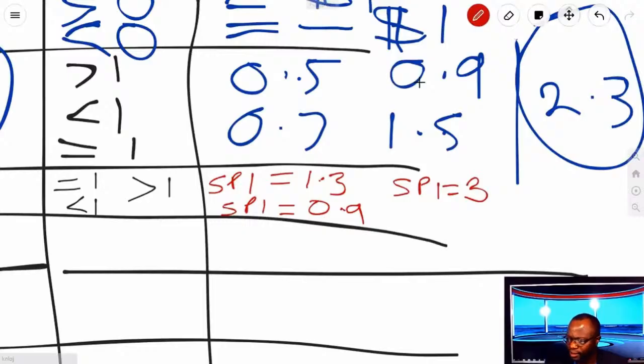What do those mean? An SPI equals 1.3 means your rate of efficiency, schedule-wise, is you planned to get a portion of work done, but you got 1.3 times that work done within that time period. It means that you're ahead.